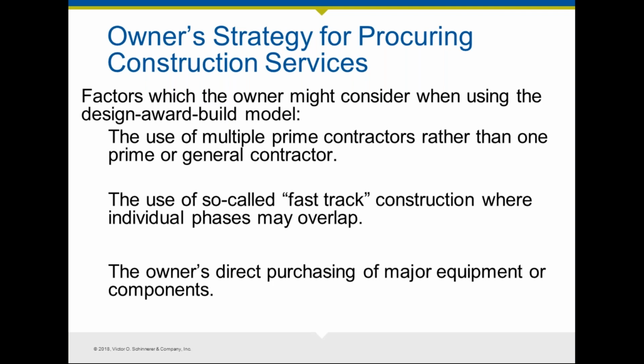Or there may be utility relocation required on site that could start before the rest of the project is started or permitted. So this could well be something that the owner may decide to do, and the earlier that the owner can identify what their strategy is, the better off you are. They may decide to directly purchase major equipment or components that they know they're going to use. It's not unusual, for example, for a wastewater treatment plant operator to go ahead and get the equipment directly from the providers.